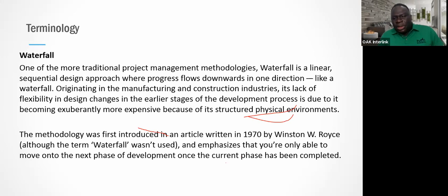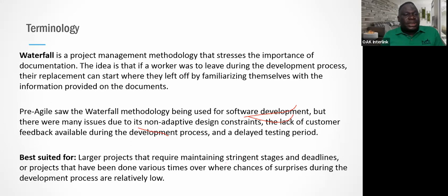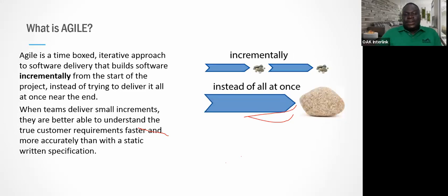Now, the waterfall methodology, like I said, is a process-based approach, while the agile methodology is what we call a principle-based approach in the way a project is being managed. The waterfall methodology emphatically follows a set of processes. There are 49 of these processes, and they are grouped into 5 groups. Unlike the agile methodology, which follows a set of principles and values.